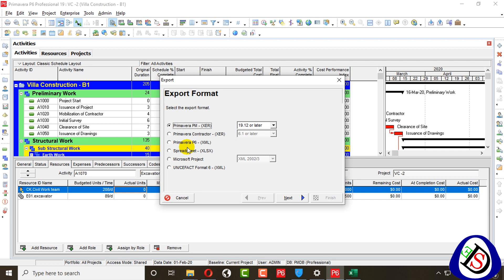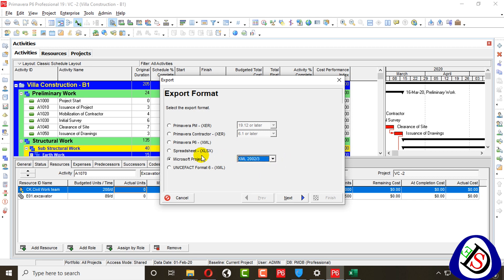We can also make a Microsoft Project MPX or XML file — including 2013 and other versions — as well as an XLS spreadsheet. There are also contractor versions and P6 XML file versions. The formats most commonly used are Primavera P6 XER, Primavera PM XER, and spreadsheet. Microsoft Project users also commonly import and export using the MPX format.